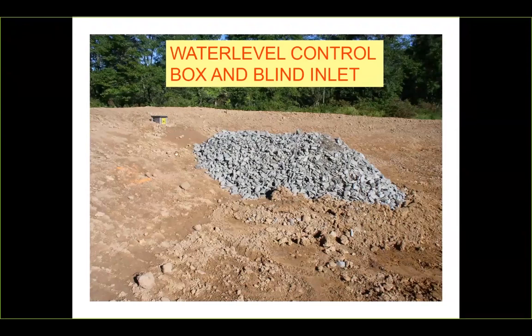So right now we're talking about the BMPs, mostly, after they're completed. But as part of your construction inspection responsibilities, you're going to come in here and, just as with the earthwork we talked about under that tank, you're going to verify the elevations and the grades, the cutback slopes. If you're tapping into an existing structure, you're going to verify the materials that they're bringing in before they start to backfill. You're going to verify that the right outlet or inlet is selected for the structure that's going in the ground.